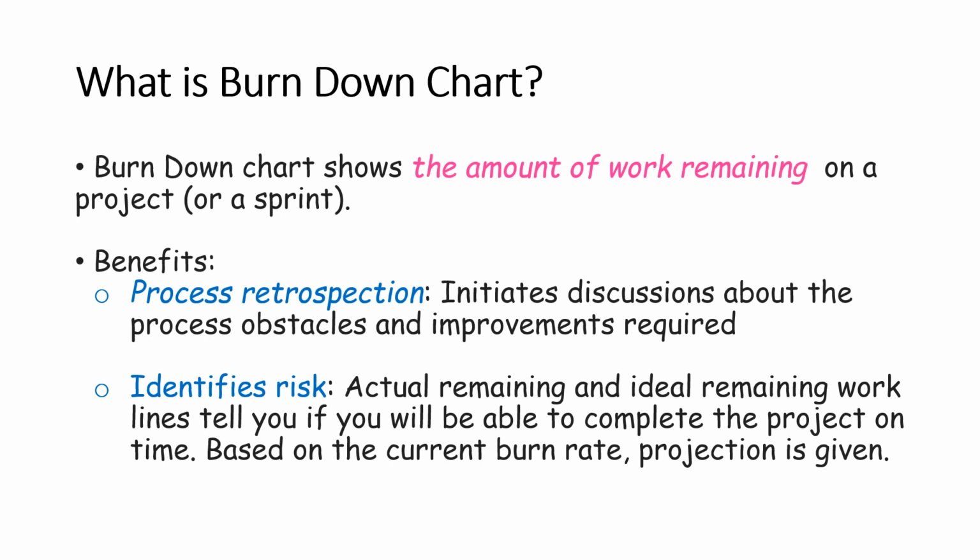The benefits of burn down chart are that first, it gets you into a process retrospection because if the amount of work remaining within a sprint is not decreasing significantly as the days are passing by, then definitely there are some bottlenecks in your process. So you can initiate discussions with your team about the obstacles and how to remove them.